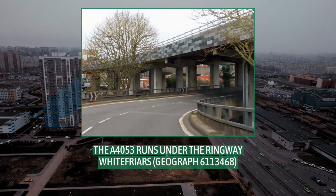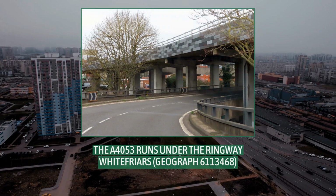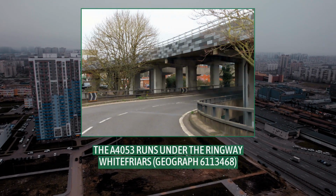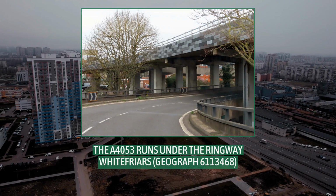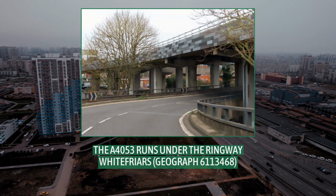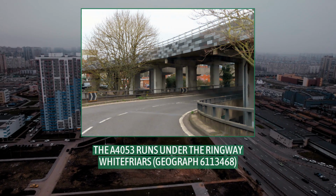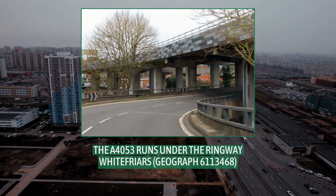The cost was estimated in 1971 to be around £5.5 million, of which slightly more than £4 million was to be covered by a government grant. It had initially been proposed in the early 1960s that the work in the area would include widening the A429 Warwick Road, but there was local opposition, citing the loss of 47 mature trees, and the plan was abandoned.